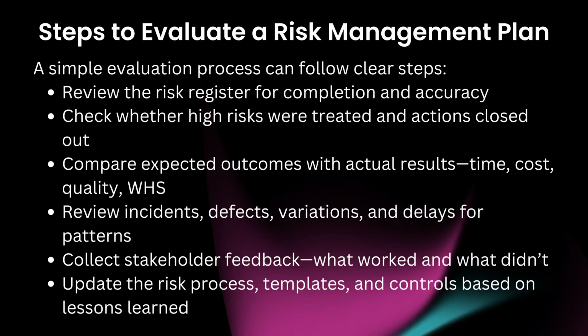Steps to evaluate a risk management plan. A simple evaluation process can follow clear steps. Review the risk register for completion and accuracy. Check whether high risks were treated and actions closed out.